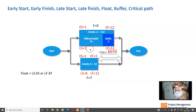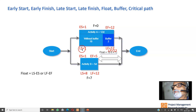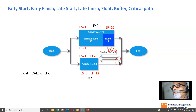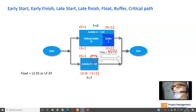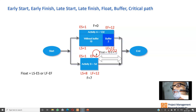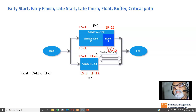By now we should be clear about early start, early finish, late start, and late finish. Float equals late start minus early start, or late finish minus early finish. Activities on the critical path will have zero float, and that is the longest path.